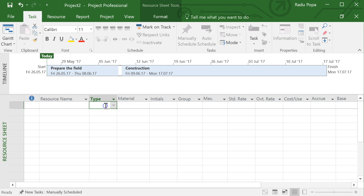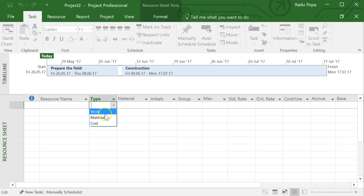In the Resource Sheet, I can define all my resources. There are three types: the first is 'Work' — for example, five workers digging ditches at an hourly cost of $10 per hour. This is a work resource, meaning someone or something that is working for a period of time.